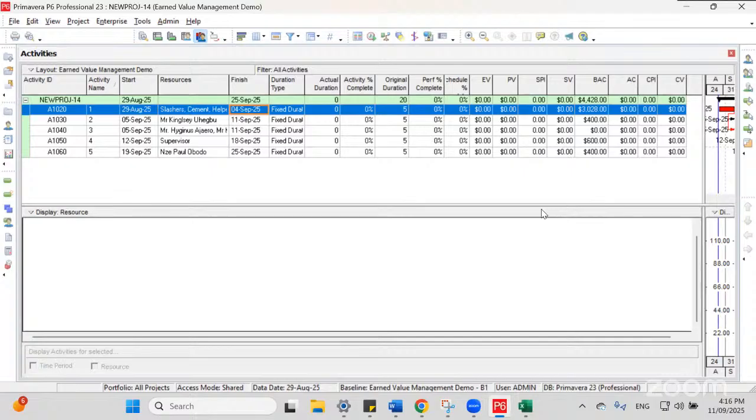Is it from the cost analyst or from the project managers? Actual cost you can take either from quantity surveyors or finance department. They will provide you how much they have spent on the activity.